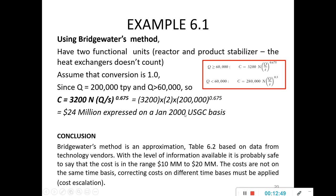In conclusion, the Bridgewater method is an approximation, while Table 6.2 is based on data from technology vendors, making it more accurate. With the level of information available, it is probably safe to say the cost is in the range of 10 to 20 million. However, the costs are not on the same time basis — one is year 2000 and the other is year 2006 — so correcting costs for different time bases must be applied. We will cover cost escalation later.